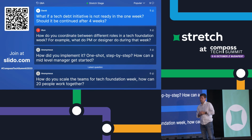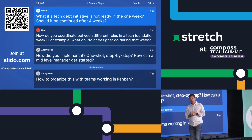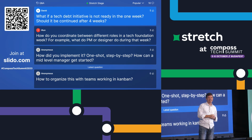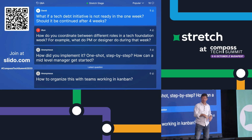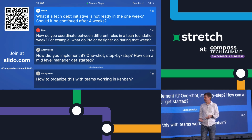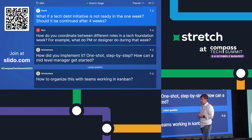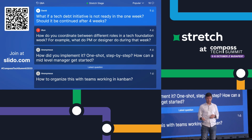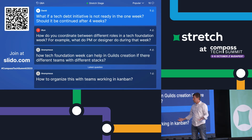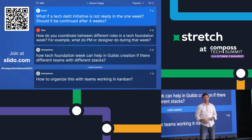David asks, what if a tech debt initiative is not ready in 1 week? Should it be continued after 4 weeks? Yeah, so wouldn't it be wonderful if you could just work on something until it's done all the time? Well, that's the sort of approach of stop everything and fix the foundations, right? And it's just not likely to be accepted or practical in your business, right? Unless you're some cash machine already. And so, yeah, you end up shelving it. My advice there is that you treat these tech foundation weeks just like a product sprint with your leaders in any of the guilds planning them. And so, break your big thing up into smaller things that fit into the week and then assemble them after a few of these tech foundation weeks. It sure beats not doing them, little piecemeal, slowly and not making real progress.